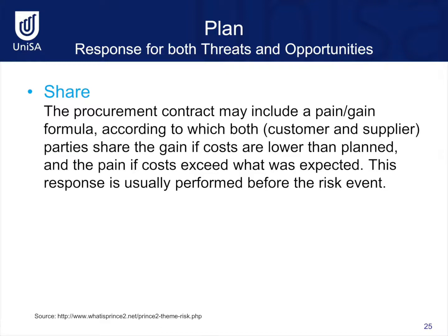Here is a response for both threats and opportunities. With a share response, the customer and supplier can choose to share the gain if costs are lower than planned, and the pain if costs exceed what was expected. This response is usually performed before the risk event.